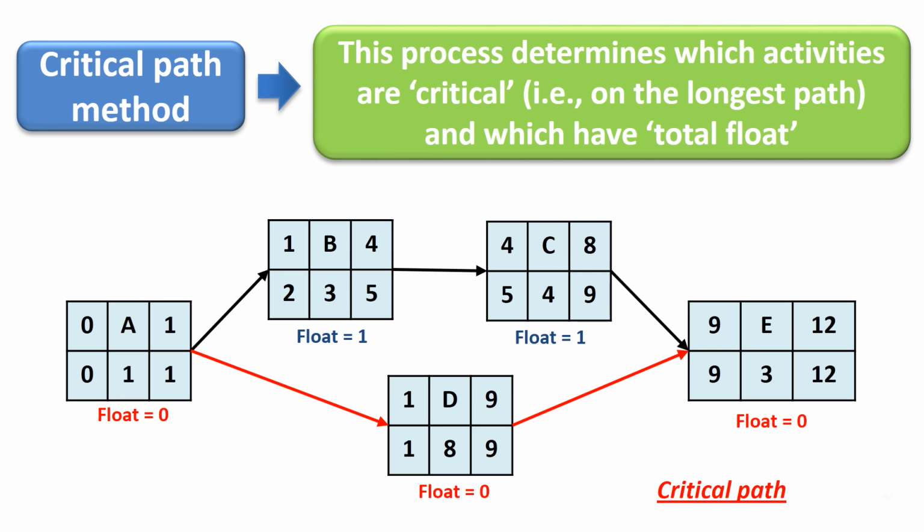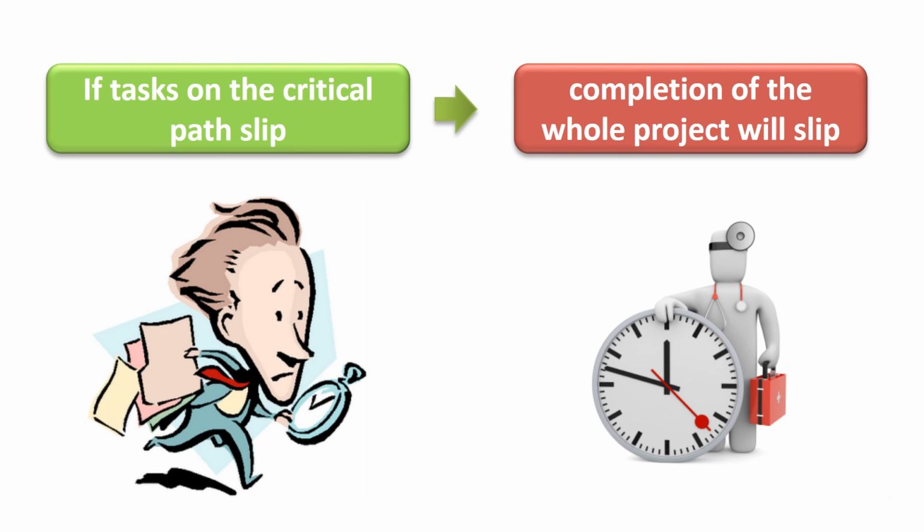Using these values, critical path method usually calculates the longest path of planned activities to the end of the project, and the earliest and latest points that each activity can start and finish without making the project longer. This process determines which activities are critical and which can be delayed without making the project longer. The critical path consists of the longest sequence of activities from project start to end that should be started and completed exactly as scheduled to ensure the project is completed by a certain date in the future.